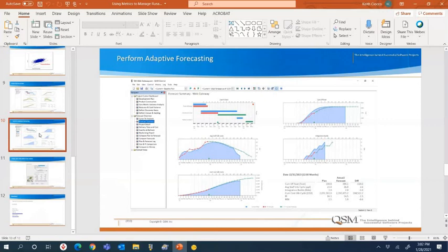If you remember that one slide I showed, the software production equation, we're taking into account multiple factors to measure productivity. The amount of work delivered, the amount of effort spent, and the amount of time it takes to deliver are all factored into that productivity measure. So if you're using story points for sizing, that would factor in along with the schedule it took to deliver those story points and the effort it took to deliver them as well.